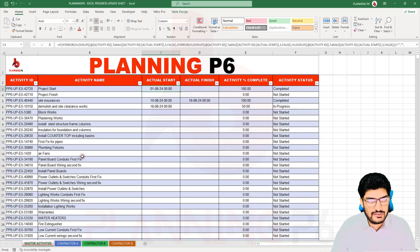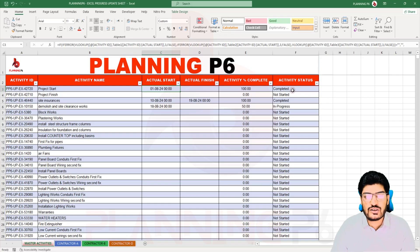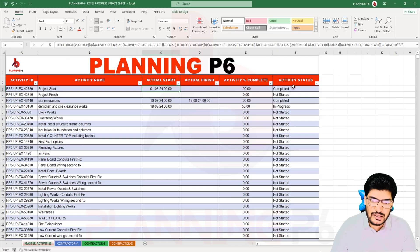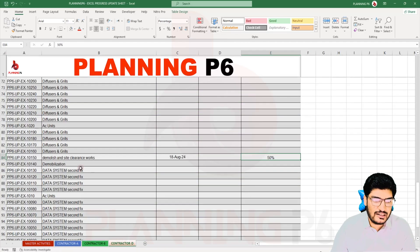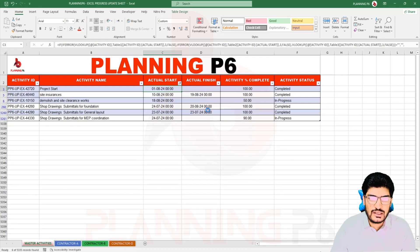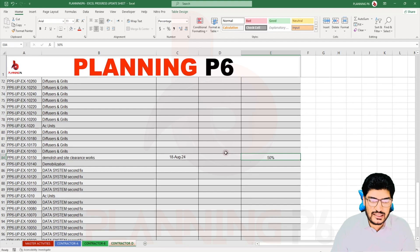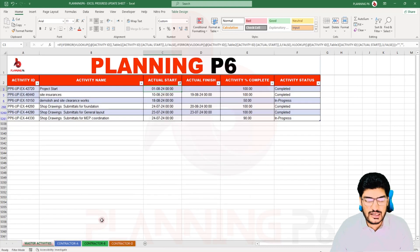Our project has more than 5,000 activities, so we will put the activities there and then take them into the other sheet. If you see there, it is taking the dates, finish date, activity percent complete, and also writing the status. We are not using the activity status here, but if you want to use it to report to the client or for filtering, you can. It is pulling from Contractor A, Contractor B, and Contractor D. I have just updated three or four activities to show how it works.